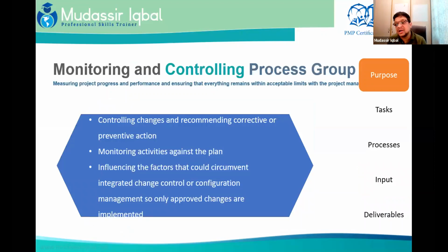Then you have the monitoring and controlling process group, the point of which is to take account of what is being learned from executing the plan, and replan on the basis of the new information. Change is going to happen, so do not worry about it. Pivot, try to make a replan in order to prevent future project work from becoming too detached from the plan. Evaluation and comparison of the actual measured results against those planned is the fundamental principle of this process group.